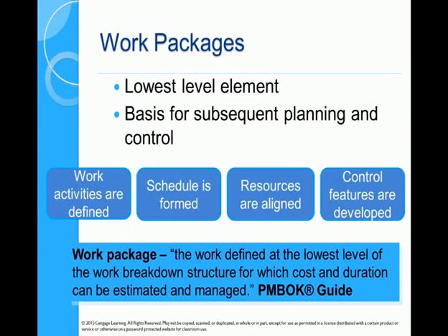So let's start with the definition. It's the lowest element in a work breakdown structure. It's when you decide that you're not going to break up the project into any more components. The work packages are like cards of work, that once that work has been done and that part of scope has been delivered and you deliver all the cards, then you've finished your project.